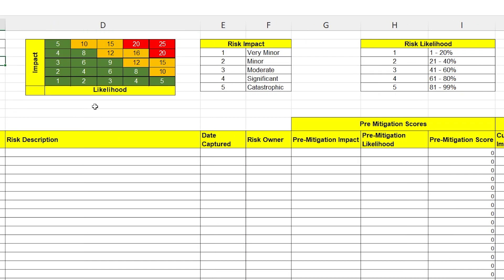Next, you can see a standard risk heat map. This is based on the risk impacts and likelihoods that you can see in the tables over there on the right. Feel free to amend the colors on here as you see fit. In this case, any risk that is scoring over 10 causes the risk to turn amber. Anything over 20 turns it red. You may need to recalibrate this depending on the needs of your organization.